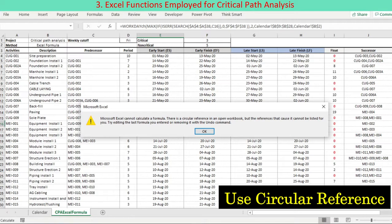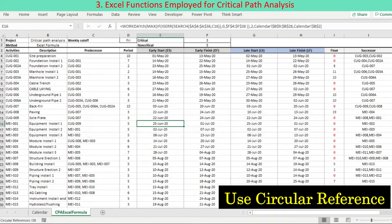Additionally, the formulas used here create circular references in the workbook. Early start date in column E depends on early finish date in column F, and early finish date in column F is dependent on early start date in column E. This makes a circular reference between column E and column F. Usually, a circular reference in a workbook indicates that a formula contains an error and Excel displays a dialog box. However, there are occasions when a circular reference is exactly what is needed to accomplish a particular task.